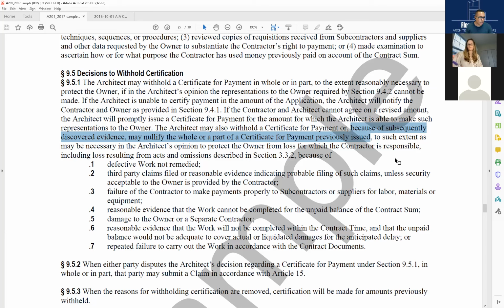Here I'm just saying that in our schedule of values, there probably would have been an item saying leveling of concrete flooring to receive new flooring, line item, $2,000. If it's in there and then they start the flooring and it's all wiggly, hey, something's wrong there, right? It's a shortcut. It's cutting corners, right?